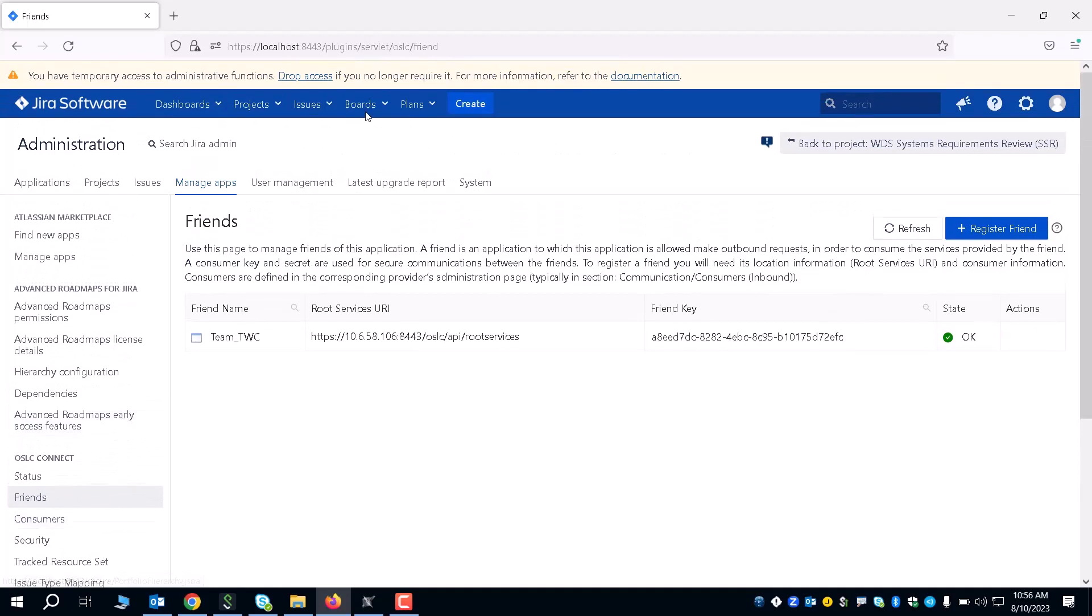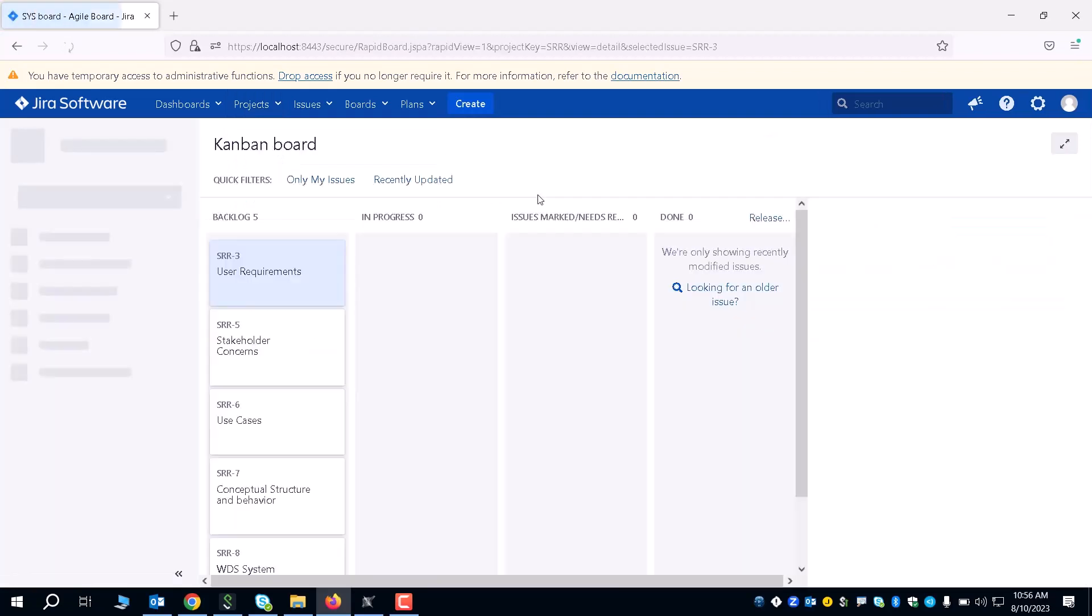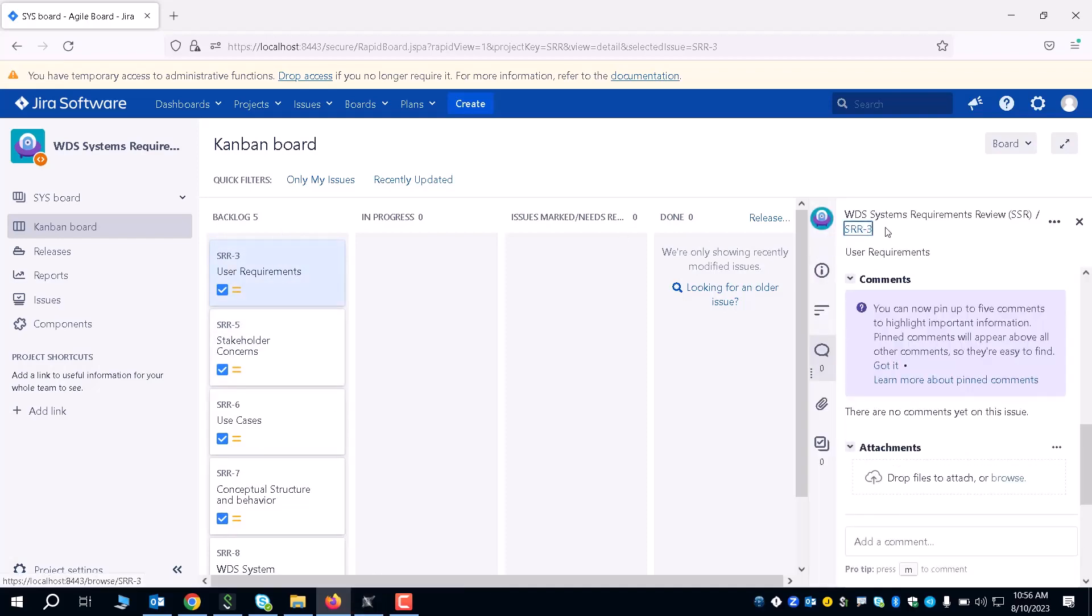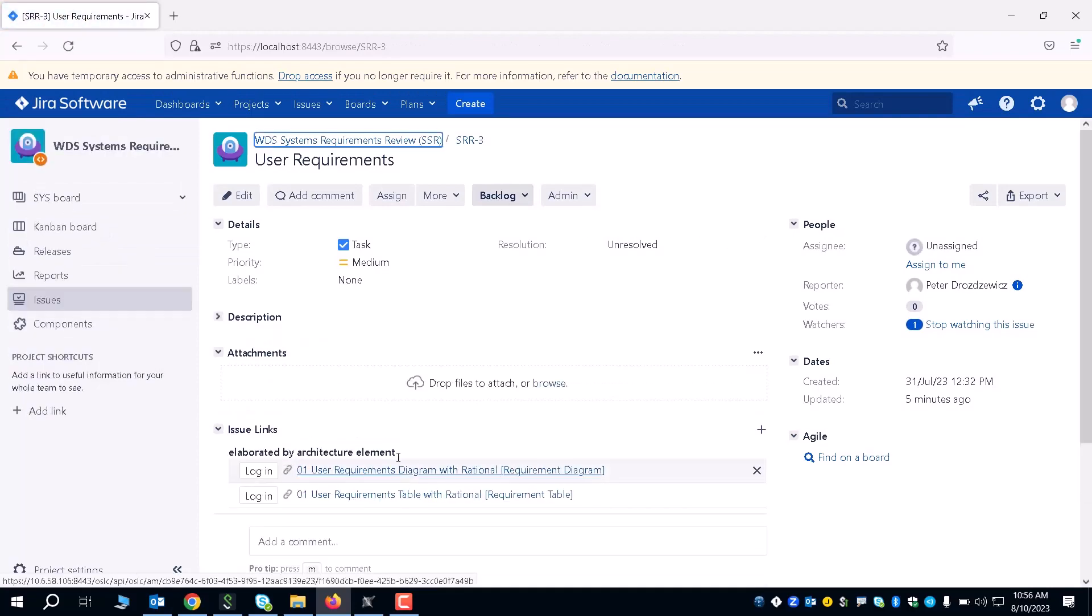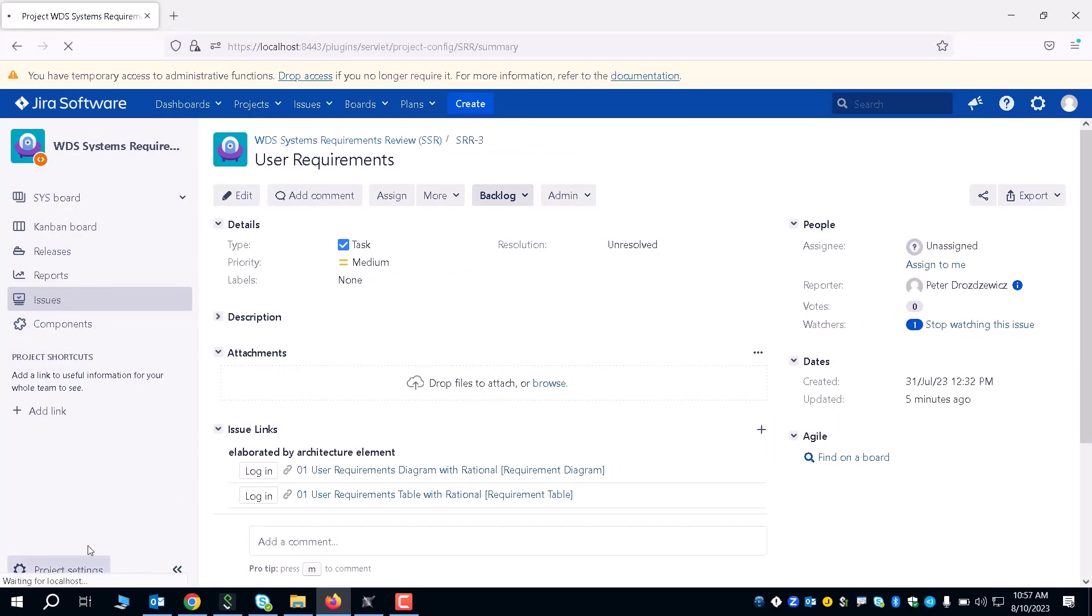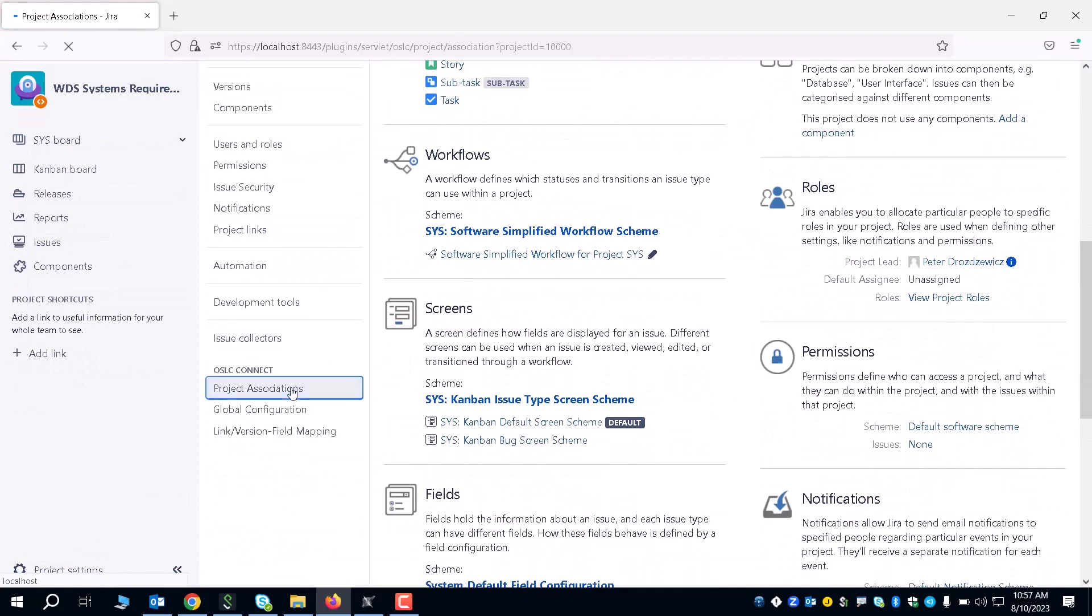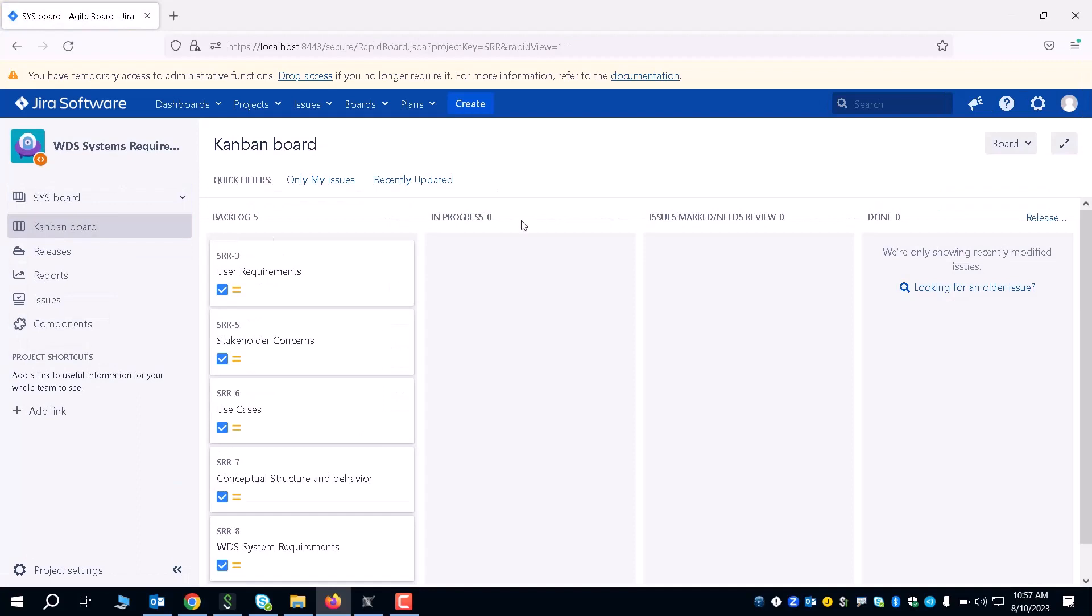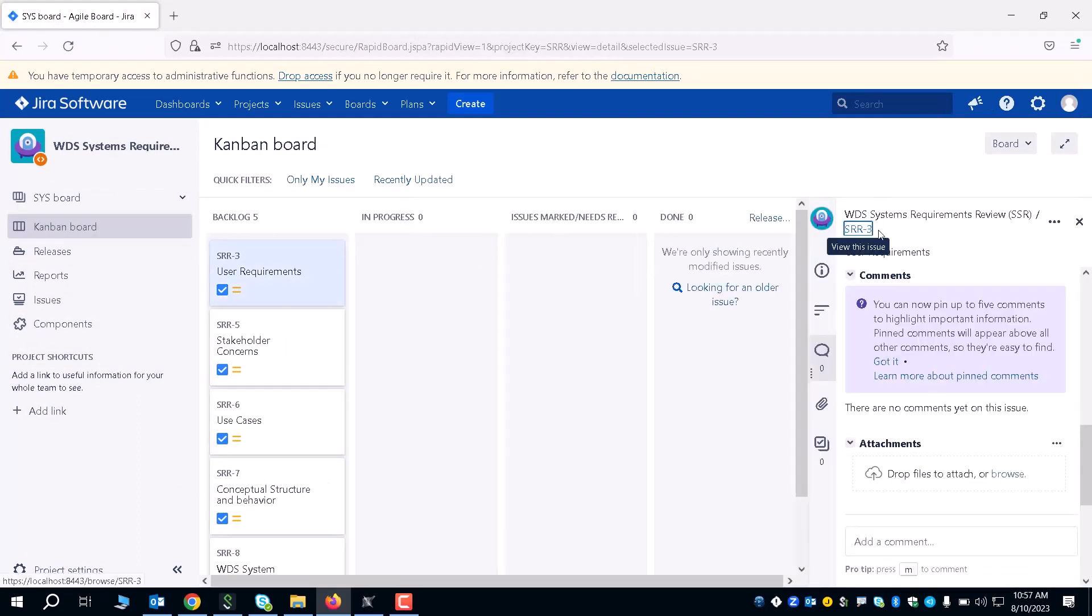After this is the next step of the integration, where you're going to want to actually go to your project. Within whatever project you create in Jira, I have a couple of tasks that are linked to reviewing certain elements within your Cameo model. For example, I have this one task called Use Requirements. This Requirements tab is linked to the specific diagrams that are in Cameo. You're going to go back here and make sure to link your project first. Click on Project Settings, scroll down to your Project Associations. Within Project Associations, you can actually select specific Teamwork Cloud models that you want to connect to your Kanban board and your Jira workflow project.